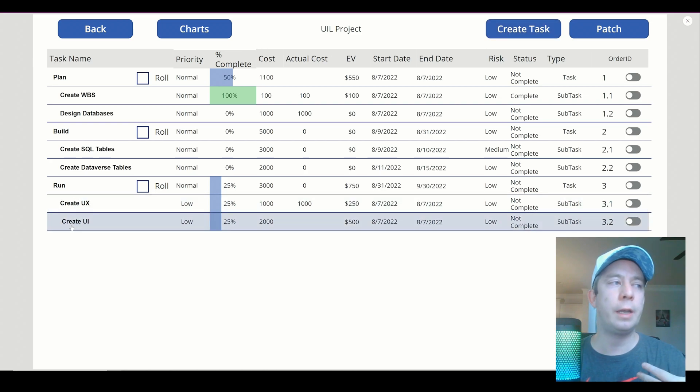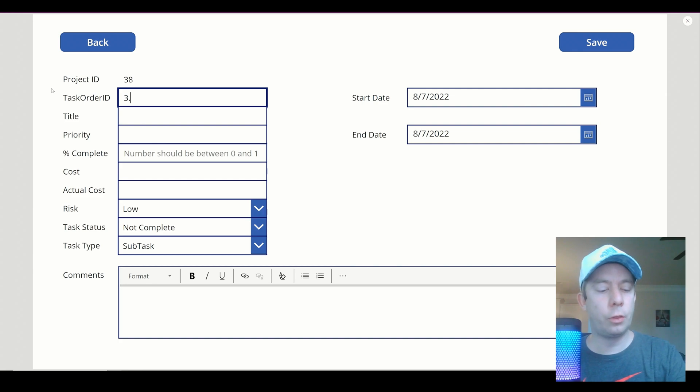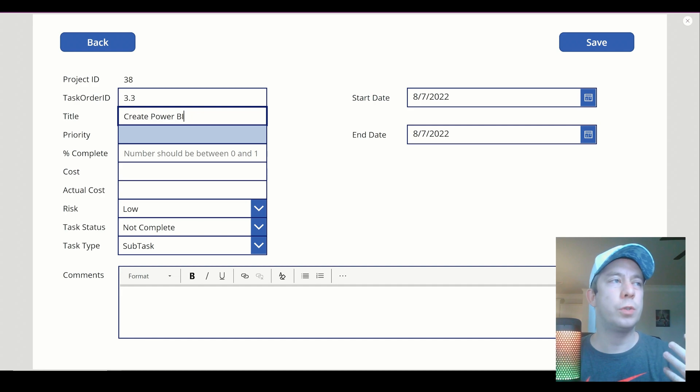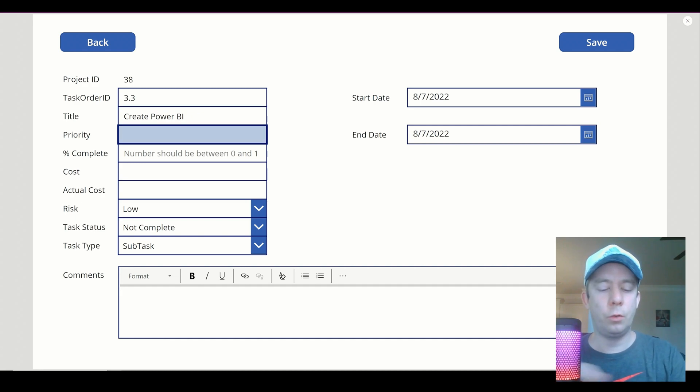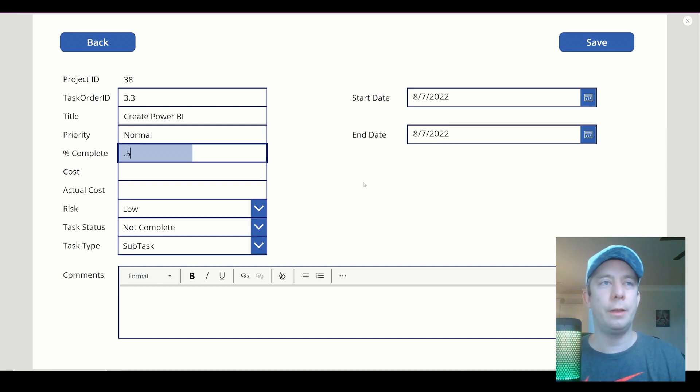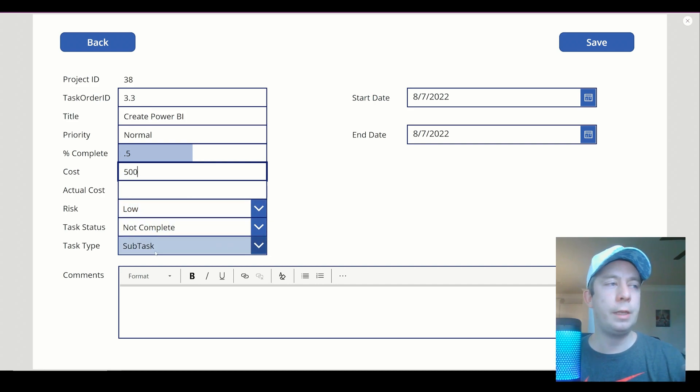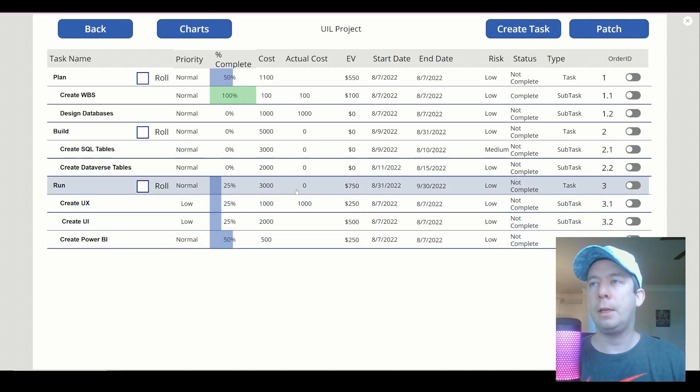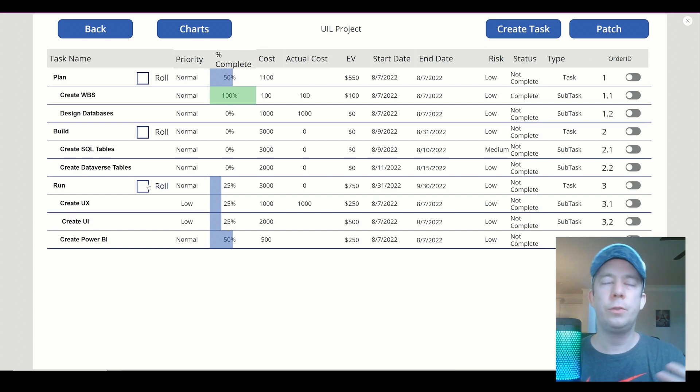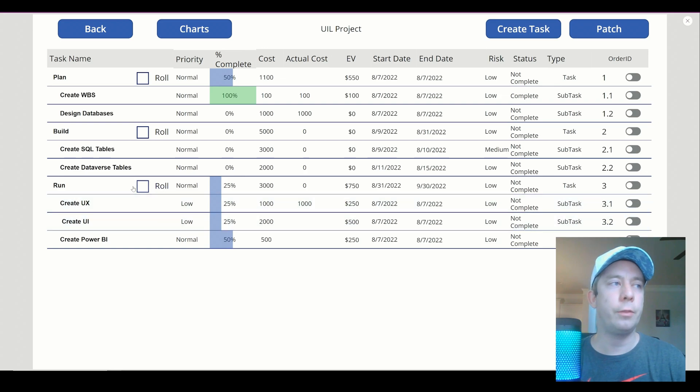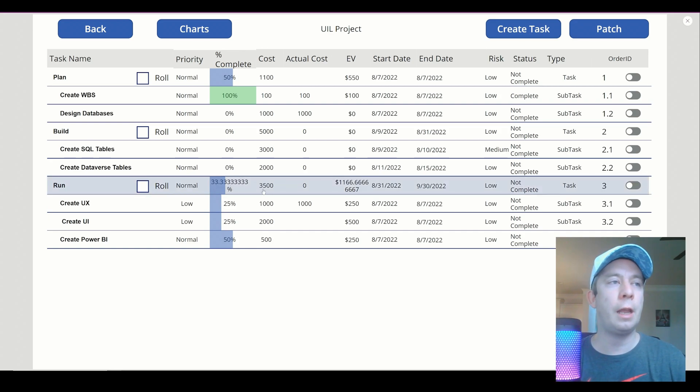So we have create UX, create UI. How about we create 3.3, create Power BI. So we'll just create some Power BI. It's a normal priority. Percent complete, we'll say we're already at 50% somehow. I don't know, just magically we're at 50%. So the cost will be 500. Everything else is correct. I'm not going to put the dates in. So we'll just hit save. Now, you'll notice it has not calculated yet. Maybe we don't want it to roll up. So that's why I'm giving the option to roll up or not. And so when we hit the roll function, it's going to be 3,500, and then these three numbers divided by three. So there it is. We now have 33.3333% and 3,500.